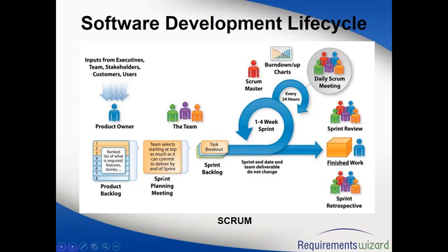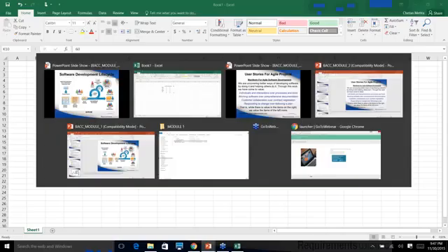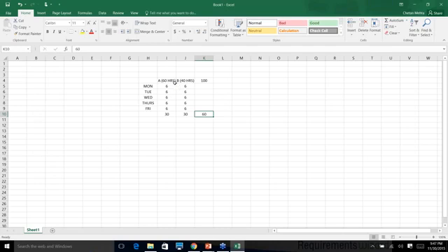So that's why you need to do a sprint planning meeting, so that the team can only take that much work which can be done in one sprint. In this example, assuming we have a 1 week sprint, that means Monday we start the work and Friday you should be done. In this case, there is no way we can do it, because maximum we get 60 hours of work, whereas we need 100 hours to do this.